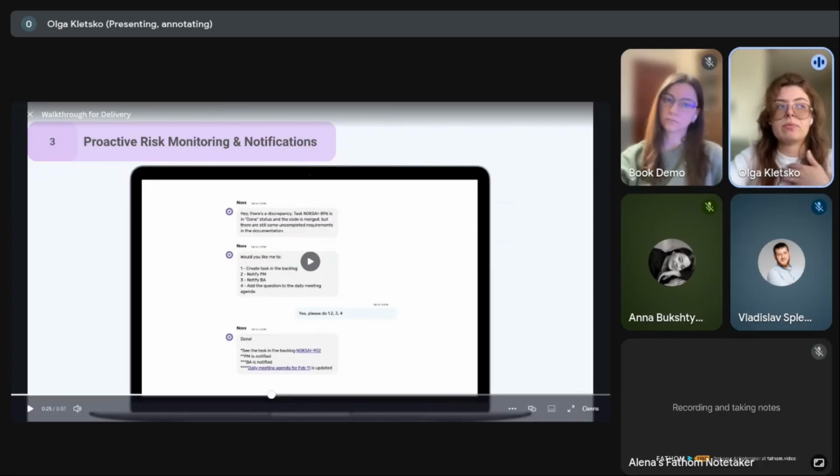For example, you as a manager would like to spend as little budget as possible and deliver as many tasks as possible within this budget. But if, for example, you notice or understand or someone reports to you that we've already spent 80% of budget and delivered less than 60% of scope, it's a problem.